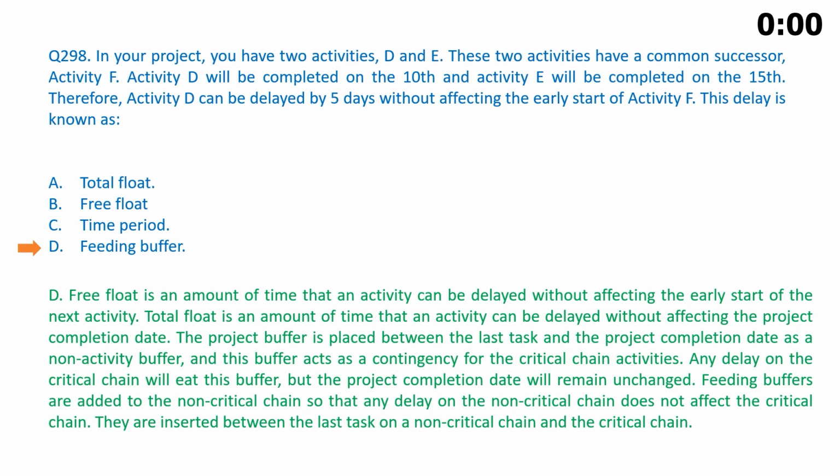Feeding buffers are added to the non-critical chain so that any delay on the non-critical chain does not affect the critical chain. They are inserted between the last task on a non-critical chain and the critical chain.